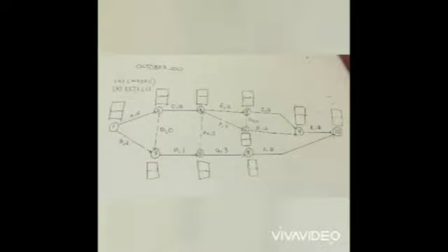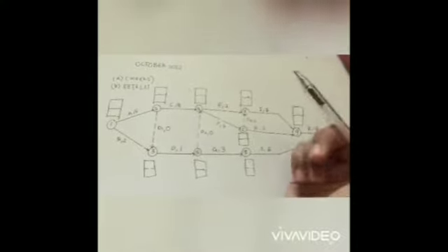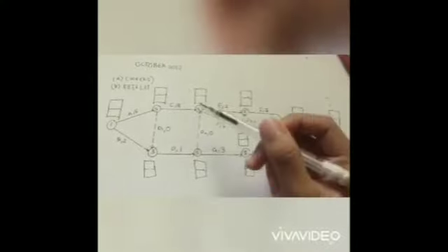Okay, that's all. Next I will continue with question B. Compute the earliest event time and latest event time for each event. So I have put B, EET, and LET, and I also have drawn the table, so it's easy for you to understand. Okay, for EET we will be adding all the numbers starting from the beginning until the ending.